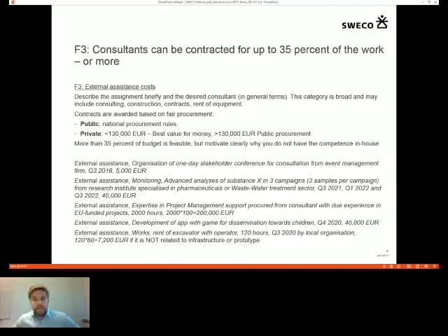If you're not sure about the cost, you make a qualified guess. You can perhaps ask the organization that is arranging events. They're usually more than happy to send you a proposal, or you can search on Google. It usually helps a lot too, and then you can add about 10% to it to make it realistic, or give you some margin for price changes in the future, and in case you want to perhaps add some more activities to this contract.